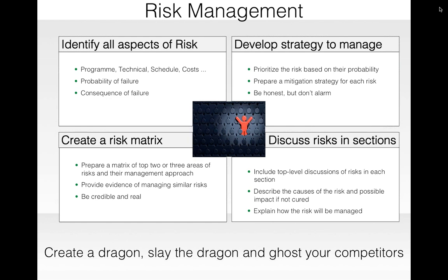You also need to explain how the risk will be managed, whether the risk will be managed by buying in those risks. At times we buy in the risk and say, okay, I will own the risks, and whatever happens, the organization will take the responsibility and do things to mitigate the risk. You can also manage the risk by transferring the risk.